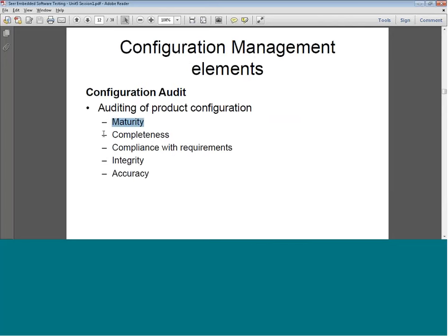So they are going to check for the maturity of the configuration items, they are going to see the completeness of the configuration items, whether it is complete or in progress or it is not complete, and check for the compliance with the requirements. That means whatever requirements there are per CI, whether it is in compliance with that, we are going to check it. And integrity, whether it is completely integrated